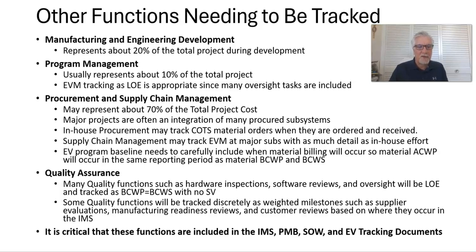So the in-house procurement department may track the COTS material when it is ordered and received, and then the supply chain management department will track EVM at major subs with as much detail as in-house effort. That becomes a project in itself when you have a supply chain manager who's responsible for the work of a major subcontractor. So between procurement, ordering piece parts, and supply chain management, managing the major subs, and the material costs for these tasks, that represents 70% of the total project costs.